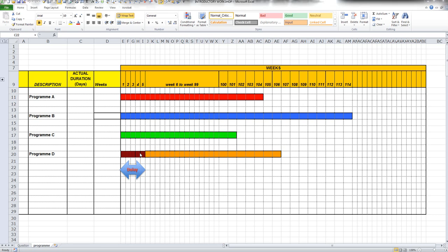However, if the contractor was subsequently delayed by other delay events which did not qualify for an extension of time, and such delays exceeded the remaining float in the program, thereby delaying completion, then the contractor could argue that the delay in obtaining access should be taken into account and an extension of time should be granted. But then we are moving to the territory about who owns the float, and we will discuss that separately.